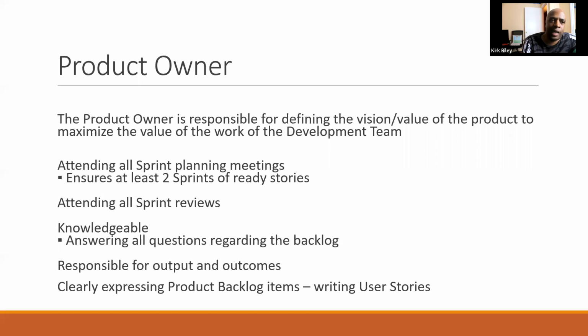And then after I'm done with my testing, the end users have access to UAT, and they go ahead and do their own testing. And once they give the okay, that's when we put it into production. And once it's in production, they continue to use it and test it. And if they see any bugs, they'll report it. But all the validation is normally done by me before I pass it on to the end user to test.